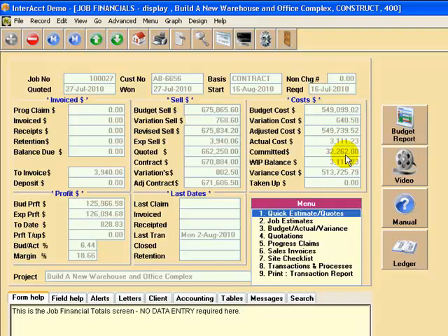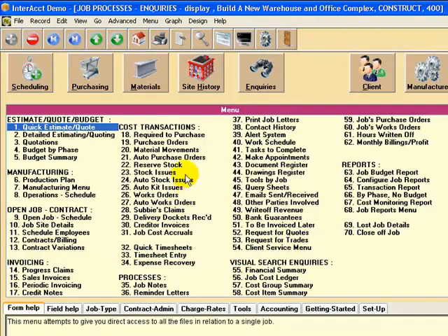Now as those invoices and delivery dockets come in for those materials, the committed costs will go down, but the actual cost, which is the field above it, will of course correspondingly go up. So that's showing you what's outstanding there. We've ordered it, but we haven't got those costs in yet. Okay, going back to this little summary here.